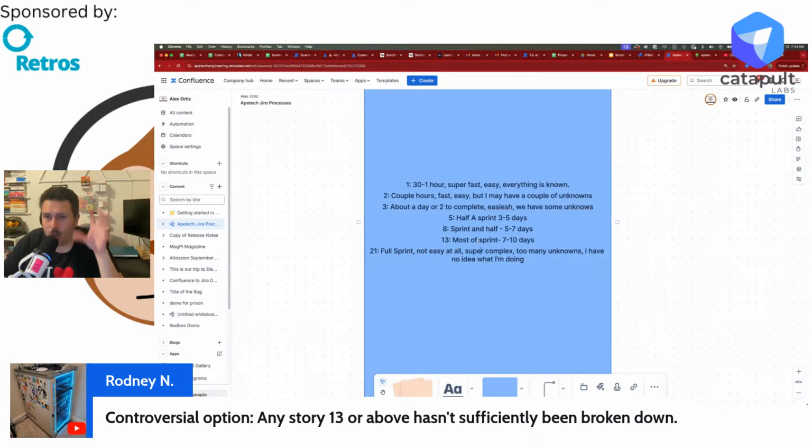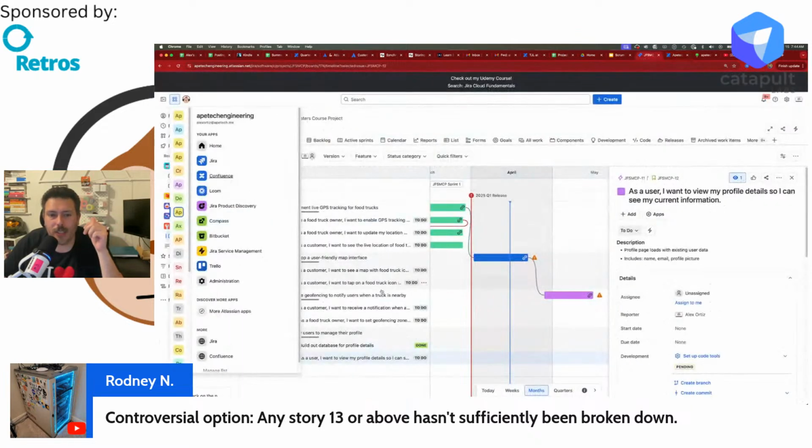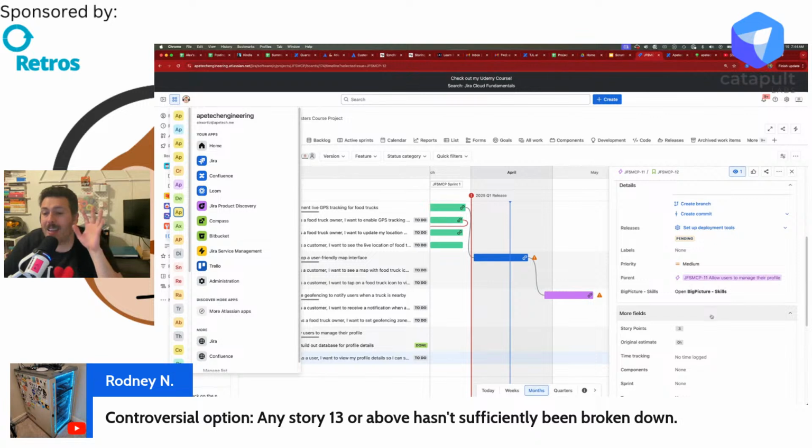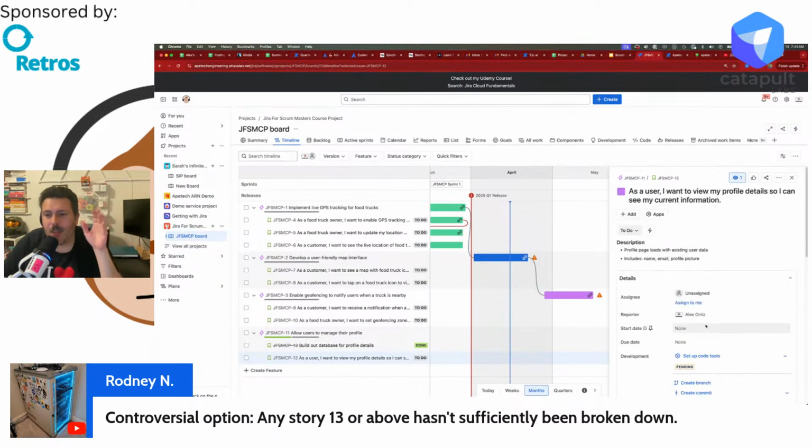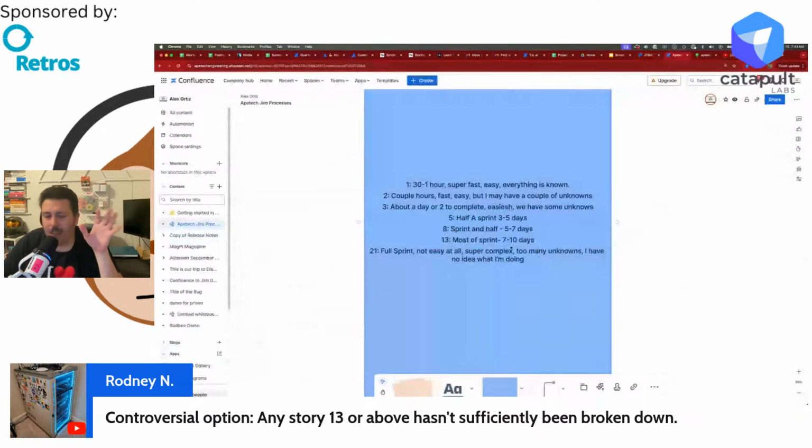That is yelling trouble. And so when you're creating your stories, and the description that you put in your title and your description, your acceptance criteria, if your team's coming back and going, this is going to be a 21, you need to stop. That is a full stop and go, what is up with this story? What about this story is so complex, so ambiguous, so causing so many dependencies and unknowns that you feel the developer compelled to give me the highest possible number we have? And that right there is, again, your clue. We need to stop this particular story and figure out how do we break it down.